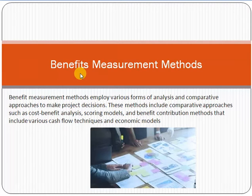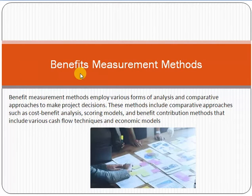For example, making a mobile application through which customers can buy food online. By using methods like cost-benefit analysis and scoring models, you can evaluate how much cost is involved, how much benefit you'll receive, and whether it is feasible to invest in such a project. If cost is very high and benefits are low, we should drop such projects.